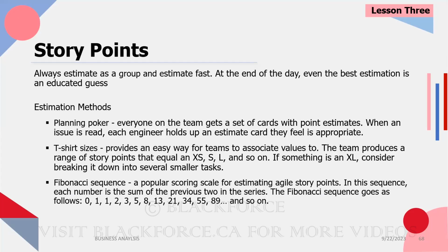Okay, we have what we call t-shirt sizes, which again, t-shirts are extra small, small, large, extra large, right? They read a story, somebody says small, another person says large, 3 people say large, chances are it's going to be large, but we're not going to discount the person who says small, right? We're going to ask them, why do you think it is small? Okay, however, if we all agree this is extra large, then chances are that story is too big. We need to break it.